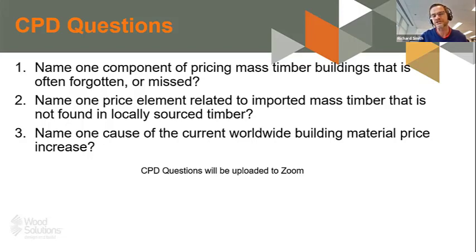We do those estimates all the time. But I think it's just a case of you have to assess a job on its merits and perhaps procure materials in a slightly different way, from a smaller timber supplier, from a timber supplier that's perhaps got some stock. So there's lots of things that would need to be considered, but it would never be ruled out as a matter of course. No way. Okay, all right.